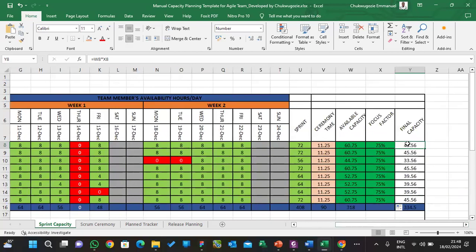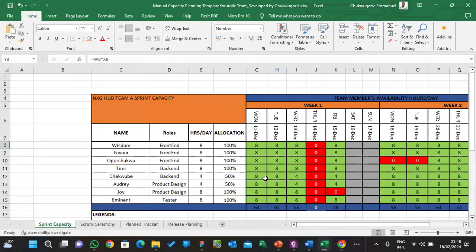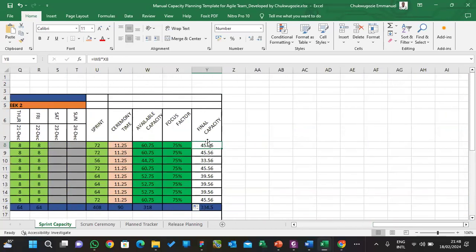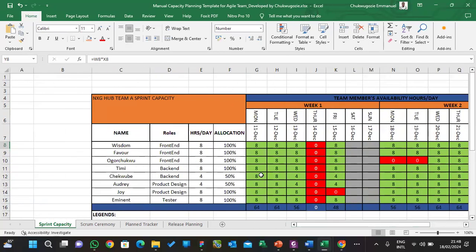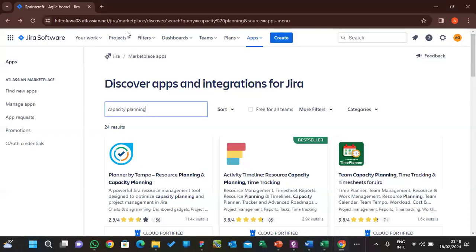But note that time is for developers. You need to track the workload of your team, while story points is for relative estimate for the user stories. So time can be used for the tasks that are broken down, like subtask and task, right? While story points, you mainly use only for user story. So I'll go back to this board now.